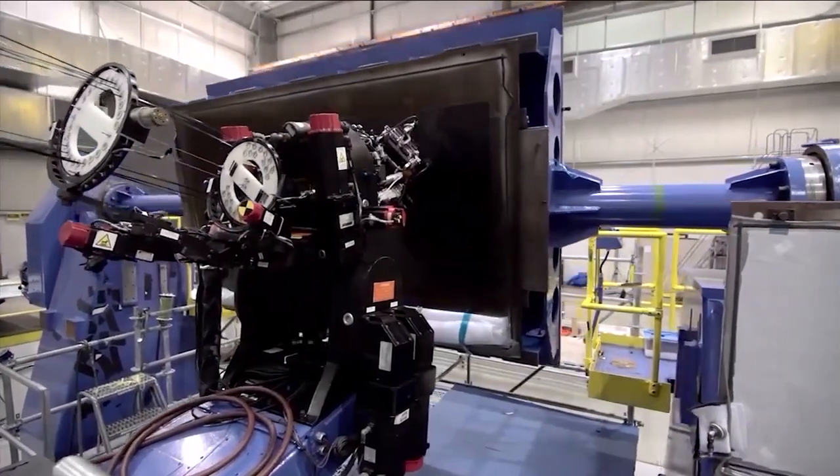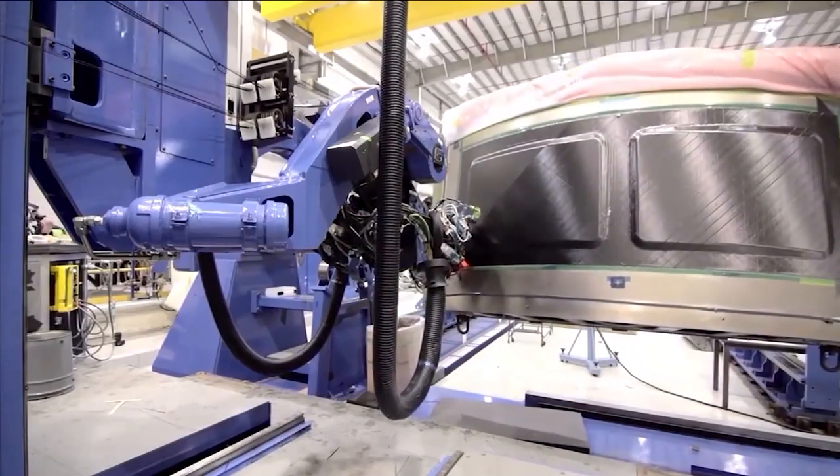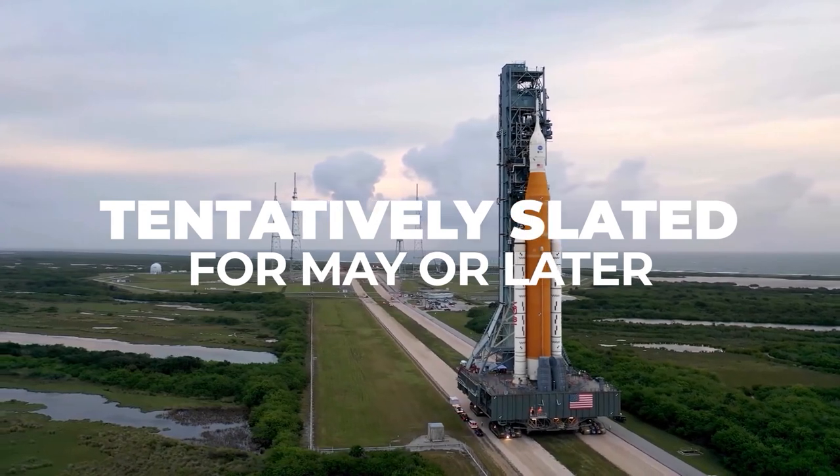And add late-load cargo and conduct final checks. The rocket will then return to the launch pad a week before the actual launch, tentatively slated for May or later.